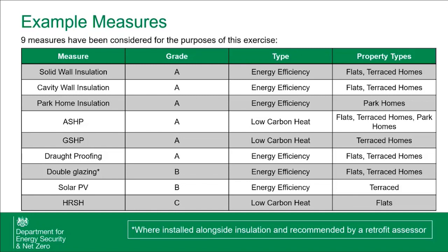Does that require those specific types of what you could class as enabling, or what you could class as part of the actual capital measure work? So I think the rule we've applied is where it is directly tied to, as in it would be incapable of doing for the specific capital measure itself, that is capitalizable, and anything else is considered enabling or on the side. I haven't been too close to the detail. All I know is that our commercial colleagues have put in more guidance on that. So yeah, I think it's where it's solely tied to the actual installation of the measure that we would expect to be capitalized, and everything else would be A&A.